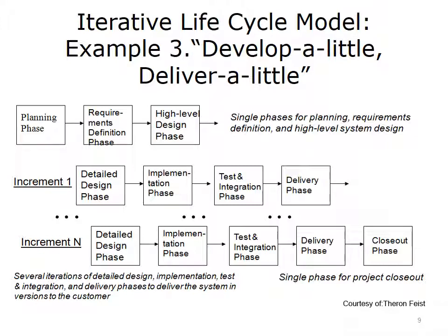Whether you build healthcare IT products in-house or you buy off the shelf, be sure to ask your vendors or your programming staff how often their upgraded versions come out. If they say they don't have a real version control process, that's a red flag. Or if they say they release upgrades on an as-needed basis, that is another red flag. Most companies will have a defined process that they go through and will have releases either once or twice a year. That schedule gives you time to implement the releases so that your stakeholders will not become confused and upset by the number of releases that they get every year.